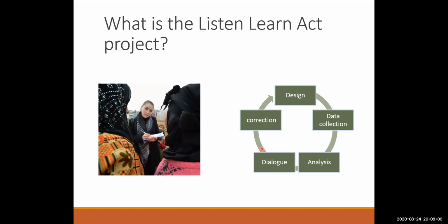So your staff will come and check that, and they will collect this information for you or for the project manager. The project manager will analyze it, and will talk with the program manager or the program officer or program assistant, and they will hear from him what the needed change is. And after that, a discussion with your management or with your donor, and you create the change inside the project, which is a correction of the way that you are using this item or this method.